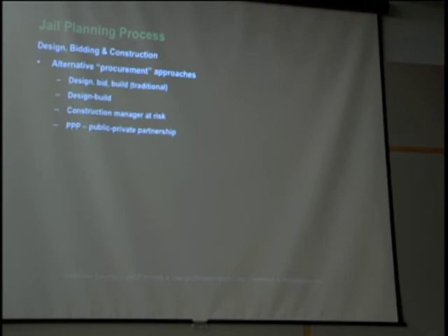California is doing a lot of justice projects with a kind of variation on that called construction manager at risk, where the contractor is hired early on and paid a fee. That's their fee for doing the work and the profit. They guarantee that you'll get it for a certain price, but they don't build it. They get sub-bids to build it within the price that they've agreed to. And we have a lot of courthouses now in California that are being constructed by this methodology.